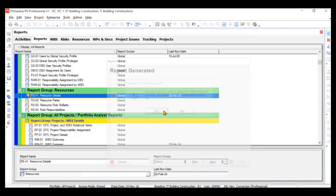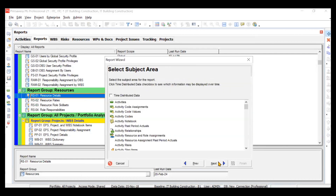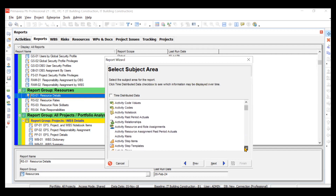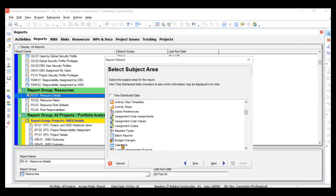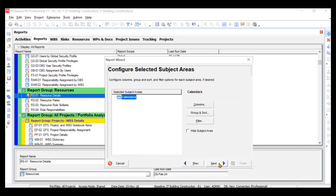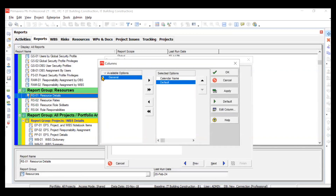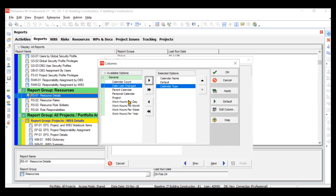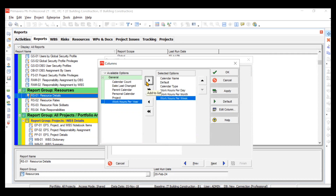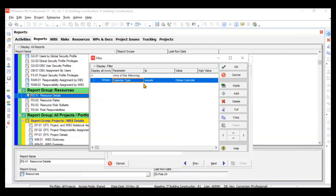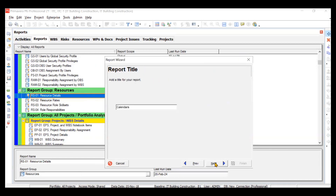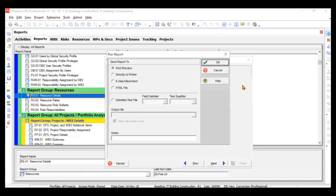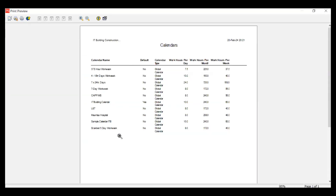Let's create one more report. Click the plus New Report button. This time we'll go for Calendars — to see what calendars are available in our system. Click Next, then customize the columns: Calendar Name and Default. You can add Calendar Type, Work Hours Per Day, Per Month, Per Week. We'll click OK, skip the filter this time, click Next, name the report 'Calendars Only', then Run Report and Print Preview. You can see all calendars with their calendar type, and the default calendar is IT Building Calendar, shown as Yes.